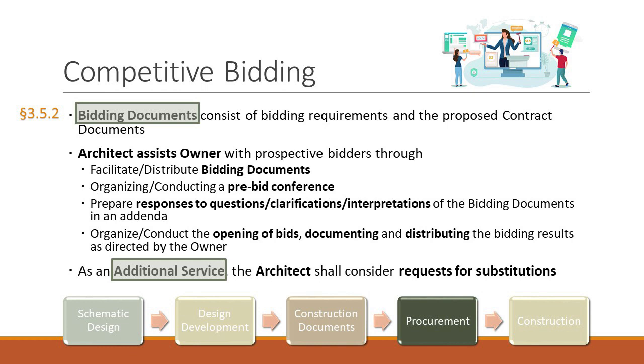If the bidding documents permit substitutions, upon the owner's written authorization, the architect shall, as an additional service, consider requests for substitutions, and shall prepare and distribute addenda identifying approved substitutions to all prospective bidders.